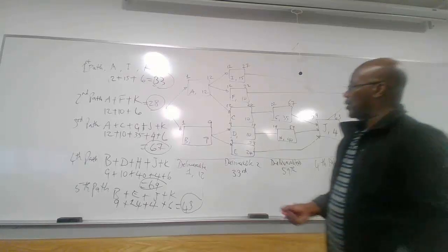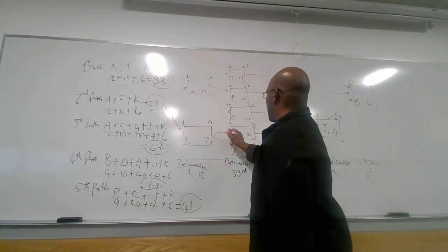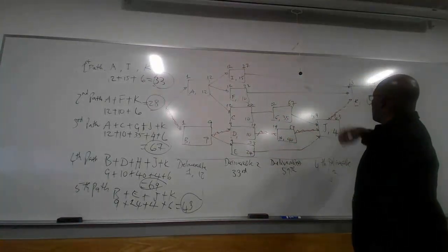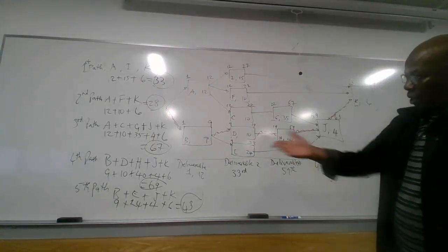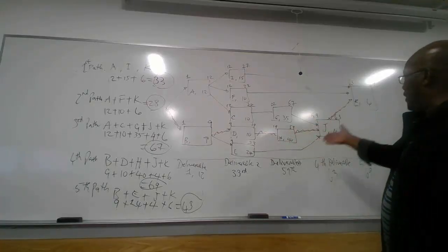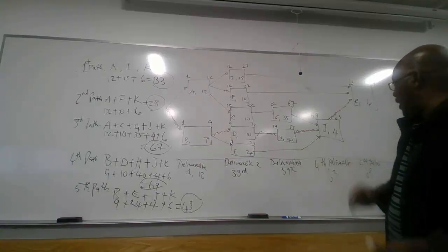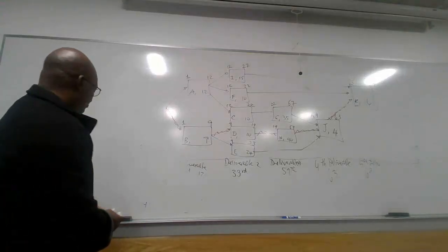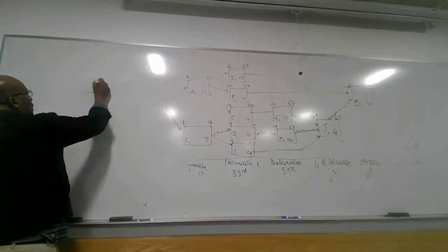That is critical. And let's create like this. That is the fourth path, and we call it critical path. The critical path is the one that is the longest, and it has activities B, D, H, J, and K. So that's how we can identify the paths. The next thing is to create the slacks. I'm going to use the red pen. So we're going to develop slacks.